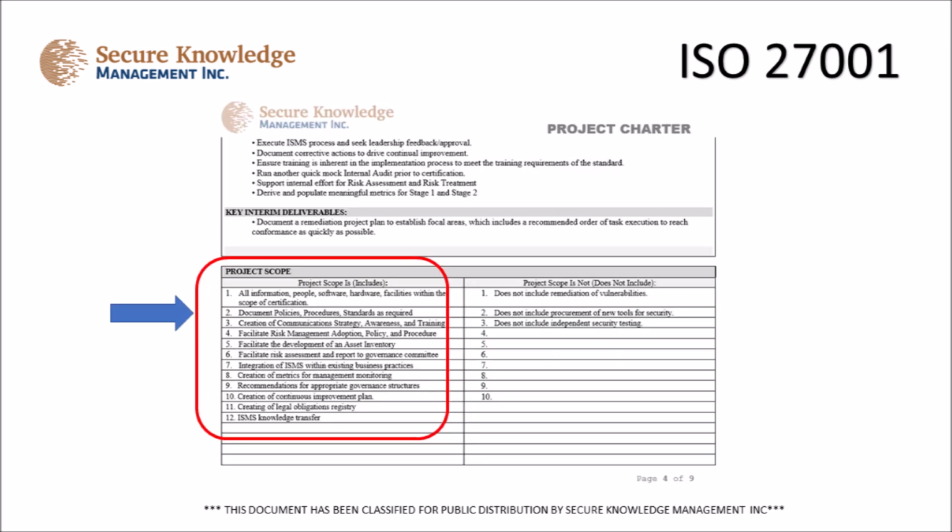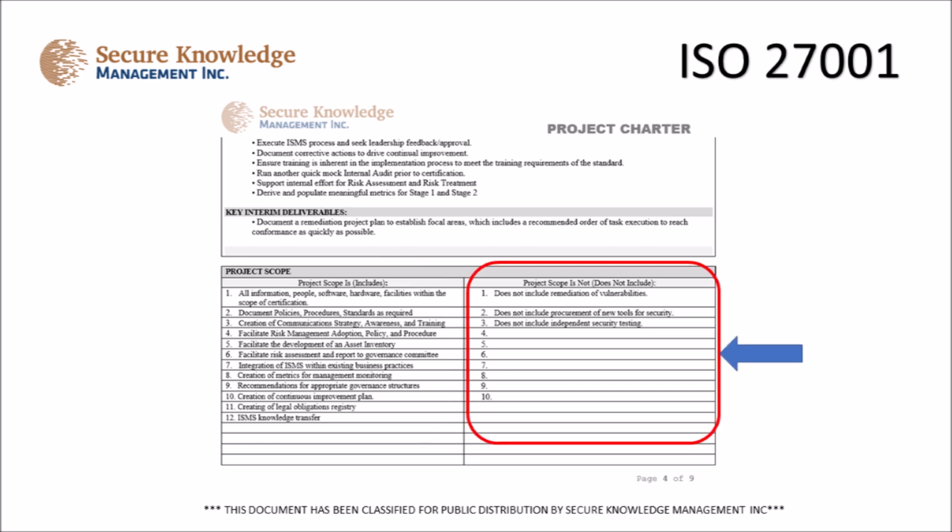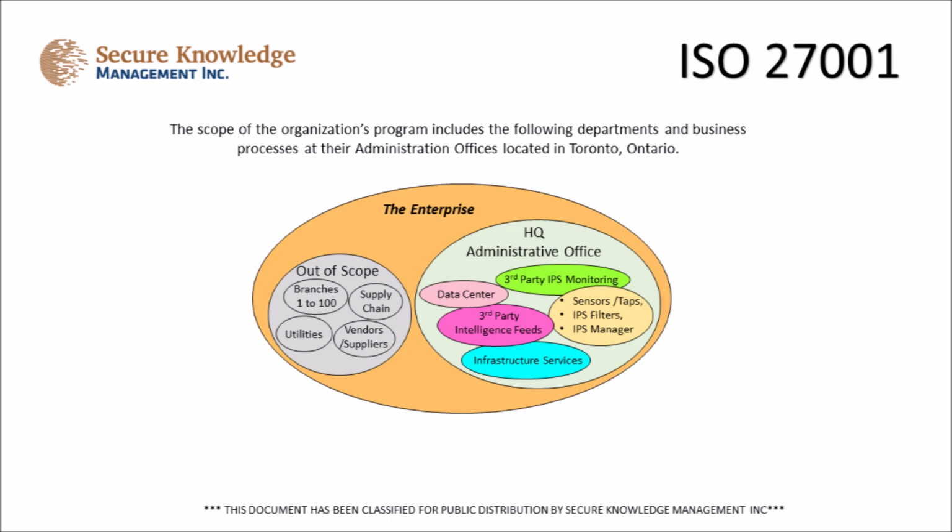In the end, within your project charter, there will be 2 tables. One table will show what's in scope, and the other table will show what's out of scope. So you should go down the list and go through the regions and the portfolios and list them. In the end, you could end up with a simple bubble diagram with a 1-paragraph sentence that tells everybody what the scope of your cybersecurity program is. What's in scope of that program, and what's out of scope of that program will be important. This is an important communication tool for everyone.